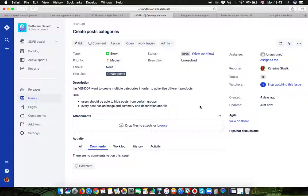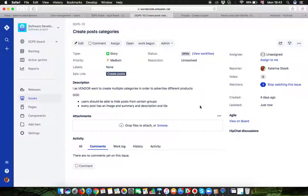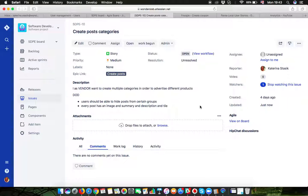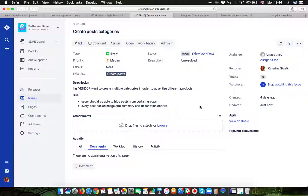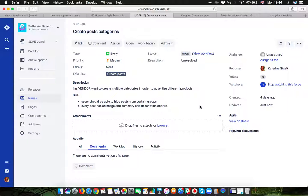Also your story should be independent in terms that it should not be blocked by another story. Each story which is blocked by a different story is not ready for development. It cannot travel to a backlog of a sprint. It should stay in a backlog of a product until the story that is blocking the previous one will be complete.